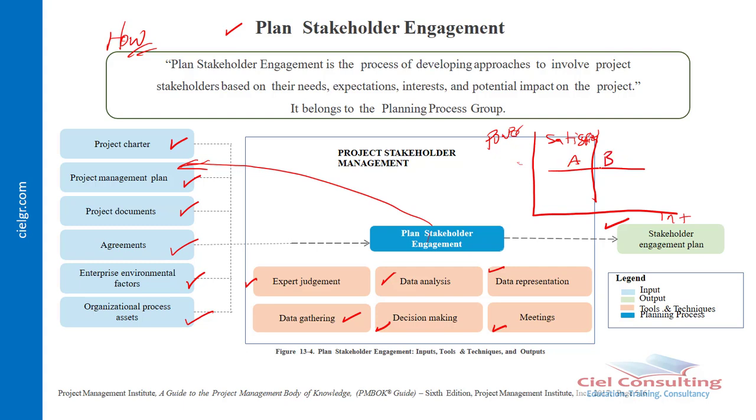Then for quadrant B that represents stakeholders that have high power and low interest, we said we need to manage them closely. So this is where we determine efforts necessary to manage them closely. What does it mean and how effectively can we do that? Then for quadrant C, which represents stakeholders that have high interest and low power, remember we said here we now need to keep them informed. So here we now determine the information that needs to be sent, and then what will be the frequency.